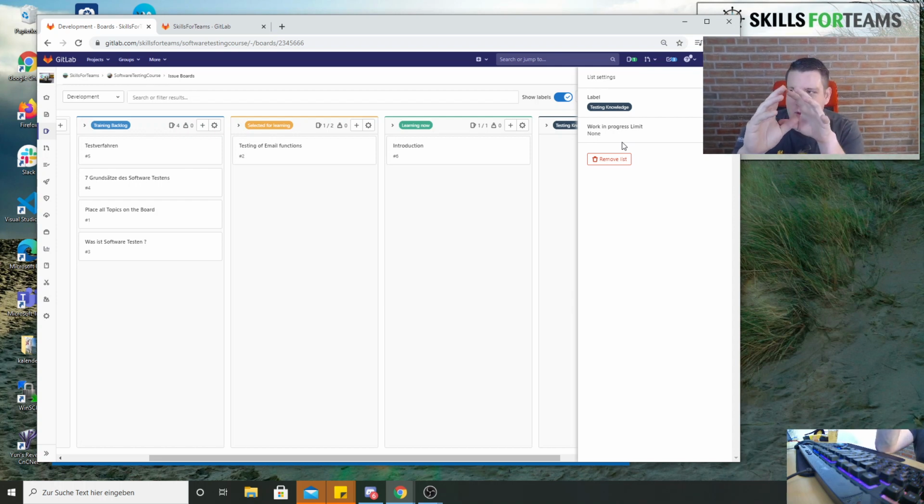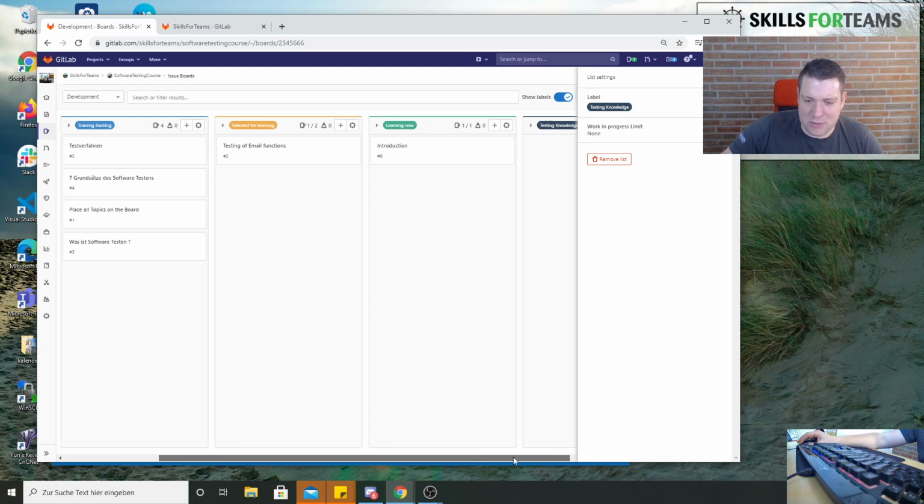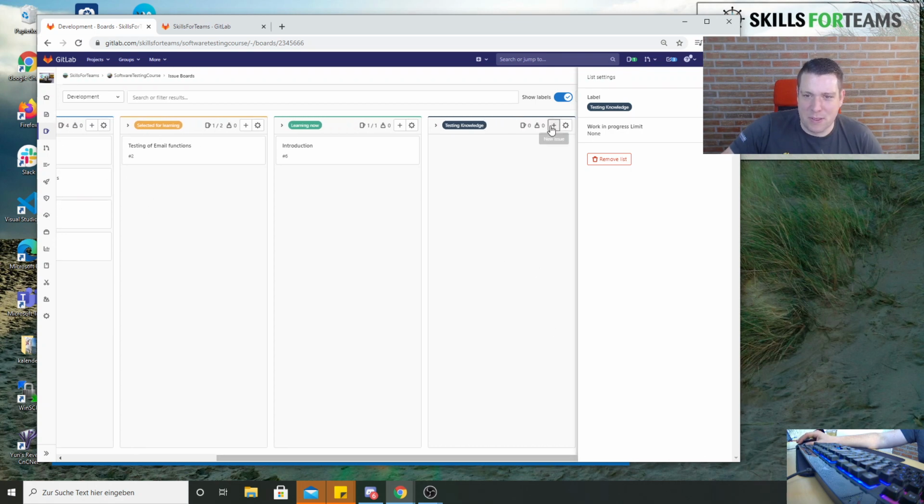So if you have, for example, a dedicated tester, and only one guy is testing all the stuff from 4 others, then you might have a problem, because, for example, if you do sprints, all developers start developing by beginning of sprint day 1, and by sprint day 8 of 10, all are finished and handing over the stuff to the tester. That will cause a problem.